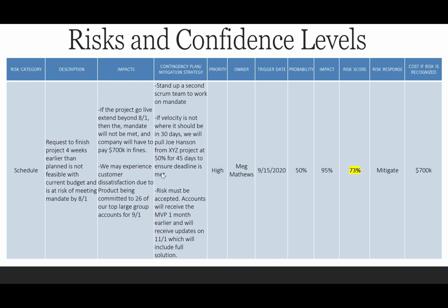And most often, that data and that piece of information is subjective. So by using our risk register, and I'm more than sure that you're going to have more than one risk, trust me, you're going to do an average of all those risks to come up with your risk score. So in this particular example, our risk score is 73%. Okay, so I'm going to come back to that because we're going to take information that's within our risk register and we're going to pull it from here into our presentation.